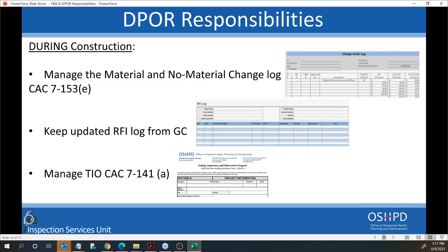The design professional of record has a lot of responsibilities in the field: reviewing IOR daily reports, reviewing the status of special inspection reports, going to the job site, walking the job site, making observation reports that become a part of the project record, approving special inspectors, and approving the approved agency. Confirming construction is matching the intent of their design and what was approved. Remember, reasonable diligence to obtain personal knowledge is everybody's responsibility who's involved in these projects.